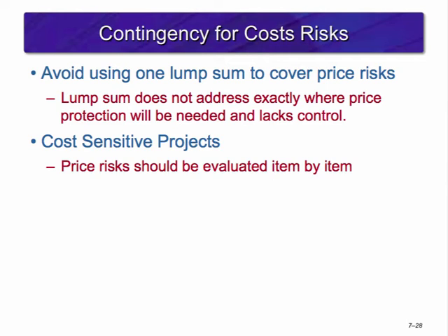For those projects that are sensitive to cost, price risks should be evaluated item by item. If purchases and contracts change over the life of the project, they should be identified and estimates made of the magnitude of change. This ensures control of the contingency funds as the project is implemented.